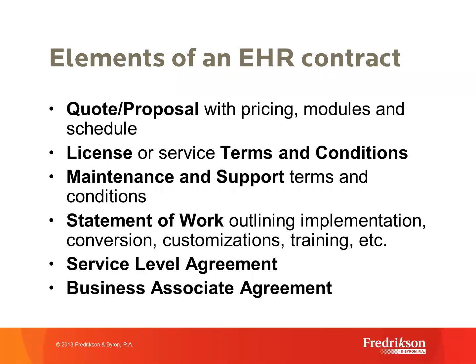So my comment here is, especially if number one is, you can reduce this problem or actually almost make it zero if you decide you want to use the same installer vendor as the EHR or license vendor. So that's one thought. Another thought is if you're using a vendor that's different, but is maybe recommended by or is some kind of a gold partner or a platinum partner or whatever kind of made up term they have for those kind of alliances, then say that in the contracts, right? Say that in both the vendor contract and in the EHR contract that the installer is a gold partner of the recommended vendor, and in the event of any trouble, they will work collaboratively to resolve the issue and not put you in the middle.